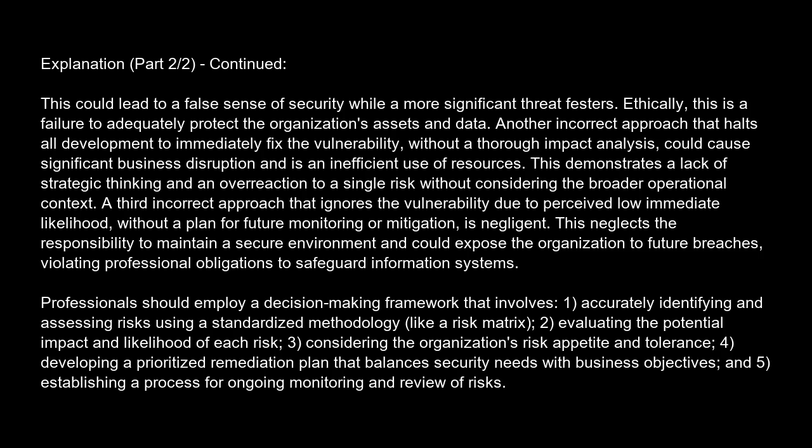Professionals should employ a decision-making framework that involves 1. Accurately identifying and assessing risks using a standardized methodology, like a risk matrix. 2. Evaluating the potential impact and likelihood of each risk. 3. Considering the organization's risk appetite and tolerance. 4. Developing a prioritized remediation plan that balances security needs with business objectives. And 5. Establishing a process for ongoing monitoring and review of risks.